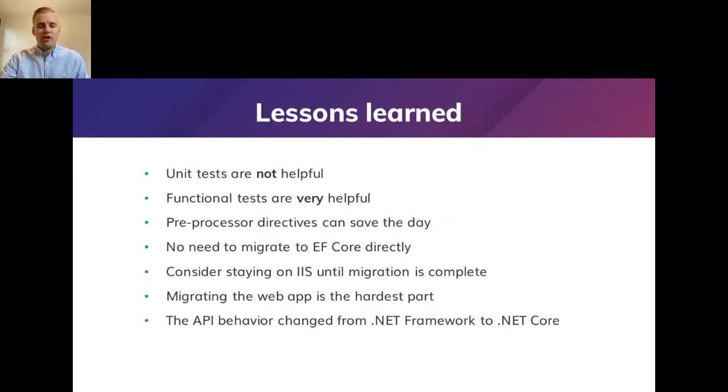So to sum up the presentation, before we jump into any questions you may have, I wanted to touch on things that we learned through this migration effort. The first thing I want to mention is that unit tests are not very helpful. We had a very mature team in the sense that they had tons of tests. We have 20,000 unit tests, 3,000 functional API tests, I think 1,000 functional UI tests, and so forth that we ran all the time. But unit tests were kind of pointless because they tested the logic, but didn't test integrations, or, of course, package updates and so forth. So it wasn't very helpful.